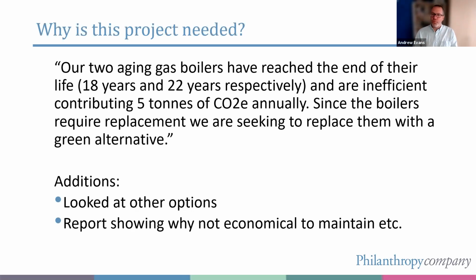So try and think, well, why do we need this project in a way that is compelling to people to fund? So here's what I came up with initially for St Mary's. Our 2 aging gas boilers have reached the end of their life, 18 years and 22 years respectively. So you're showing that something has to be done, definitely. They're inefficient, contributing 5 tons of carbon dioxide annually. So obviously you can work out how much you are doing if you're doing a similar project just from your bills. Since the boilers require replacement, we're seeking to replace them with a green alternative.